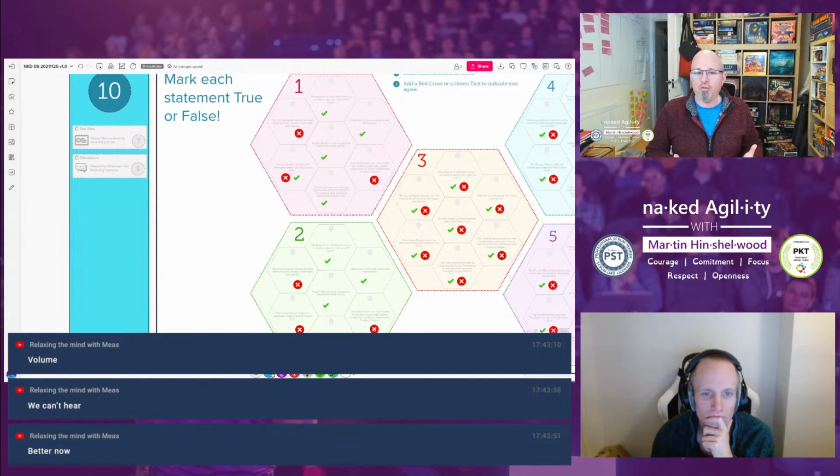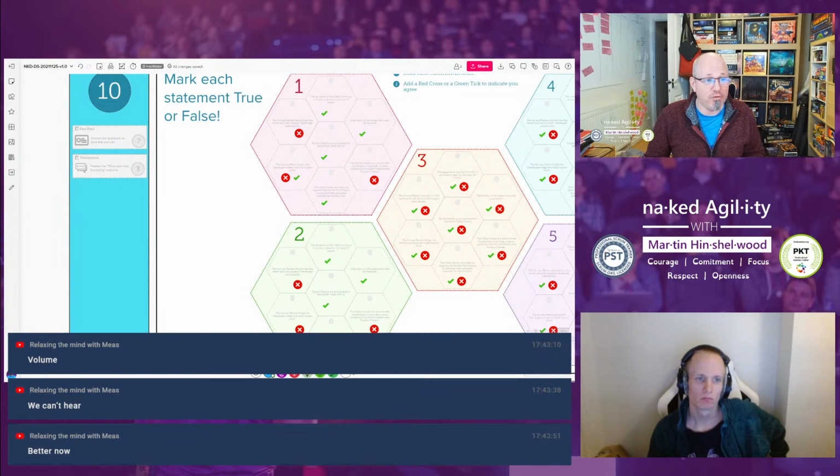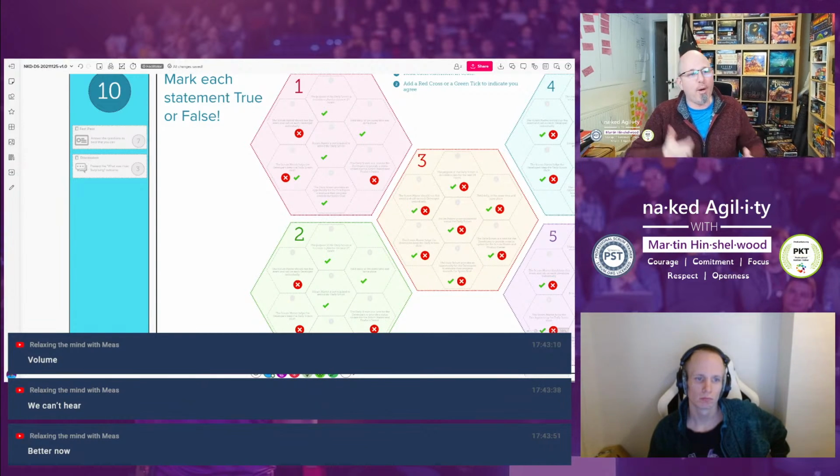And I think it's always been very explicit in the Scrum Guide that it's not a problem-solving event. If you identify a problem and you need to have a chat about something else, you can end the daily Scrum and immediately have the same group of people having a conversation about this other thing that you need to talk about. That's okay. Right? Because how much planning should we do?